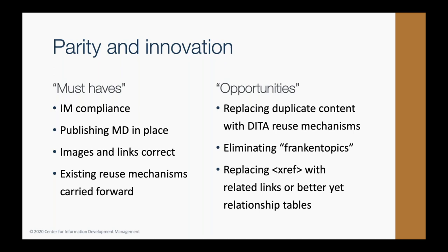My recommendation is to always prioritize all your must-haves, and then also identify what those other opportunities might be. Then assess whether you have the time and the resources to take advantage of those opportunities, or, if you're hiring a conversion vendor, whether they can help you achieve them, or whether they will be prioritized at a time after the deployment. Defining and focusing on the must-haves will ensure that you don't have any degradation in quality as you move into production, and that's really important. So I ask clients to consider this your minimal viable product.